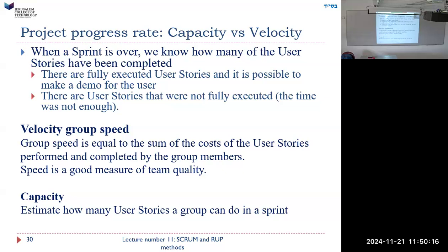In other words, if we've got, let's say our story points was 120, then we get 120 per sprint. That was our rate, the total number of points we got done. That was our velocity. Capacity is how many stories we did. In other words, the first one is the points. We add up the points, let's say it's 75. And the other is capacity, like we did 3 user stories. I mean, yeah, it's interesting.